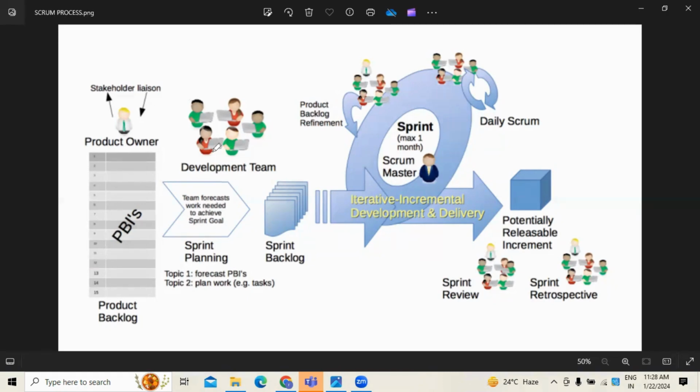They have taken some high-priority task items based on their understanding with the product owner, and want to complete the task within specific timelines, let's say 1 week. That means 5 working days. Assume 8 hours per day and 5 people working: 8 into 5 is 40 hours, into 5, somewhere around 200 hours.